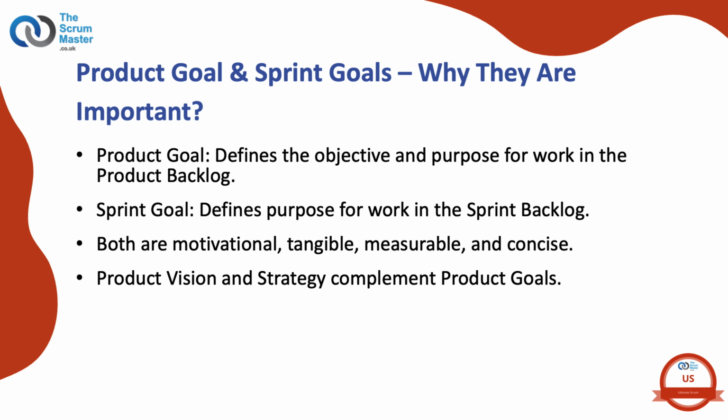Why can we only work on one product goal at a time? The product goal is the long-term objective for the Scrum team. They must fulfill, or abandon, one objective before taking on the next. Many leaders are ineffective at setting clear priorities. They either do not, or cannot, prioritize, do not communicate the priorities when selected, or develop many, for example 5+ top priorities, so that everything is a priority. Therefore, nothing is a priority.